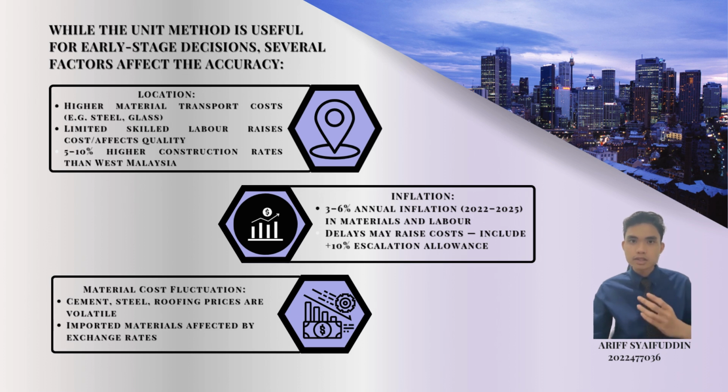Thirdly is material cost fluctuation. Prices of cement, steel, and roofing material are volatile. Imported material like certain finishes or fittings may be affected by currency exchange rates.